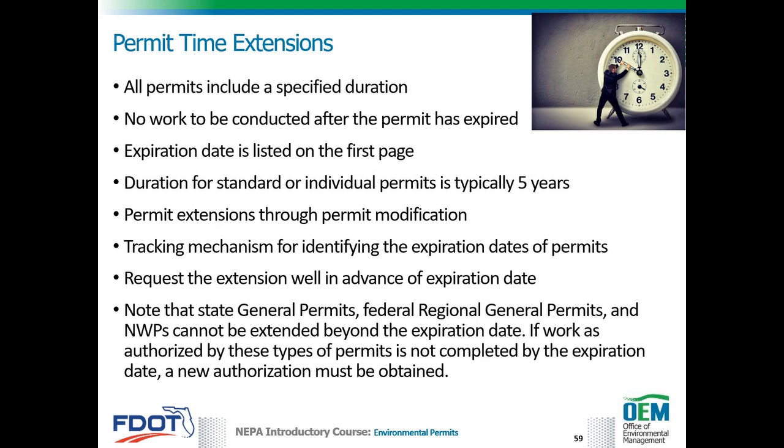Permit extensions may be granted for most projects by requesting a permit modification. Each FDOT office maintains a tracking mechanism for identifying the expiration dates of permits. Generally, FDOT's permit coordinator submits the request for the extension of the permit expiration date.